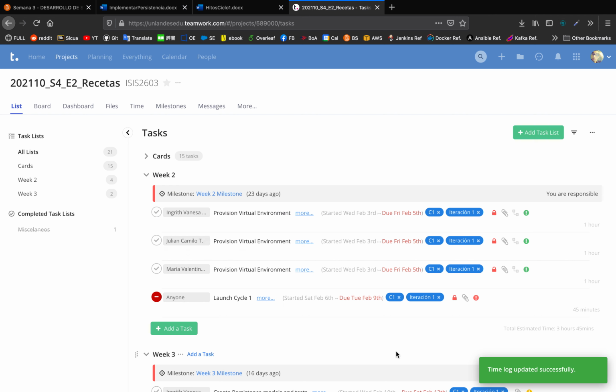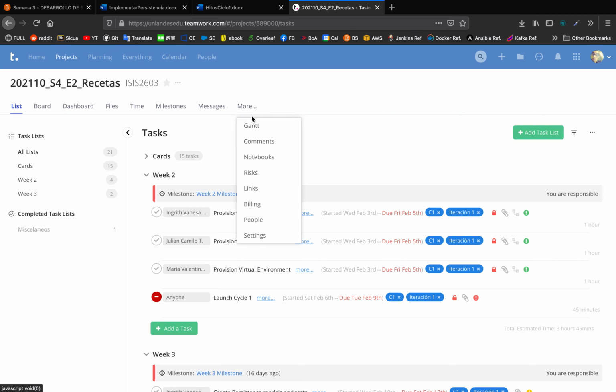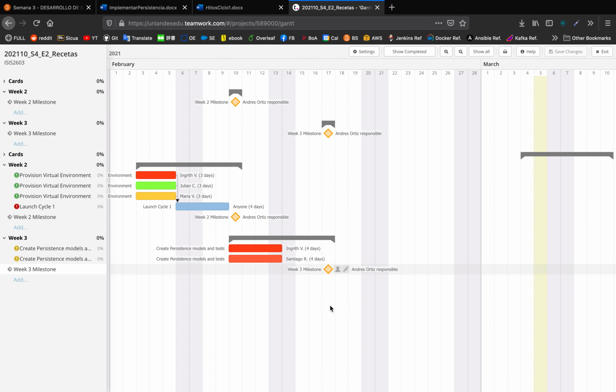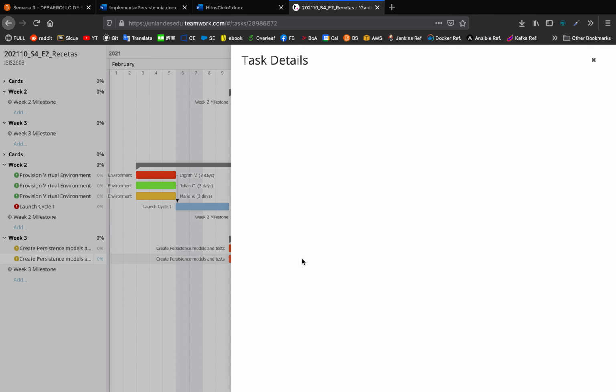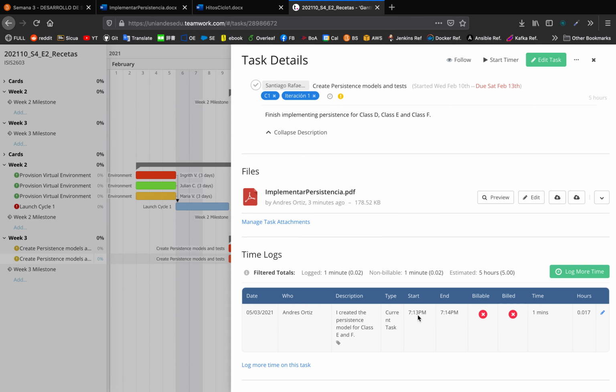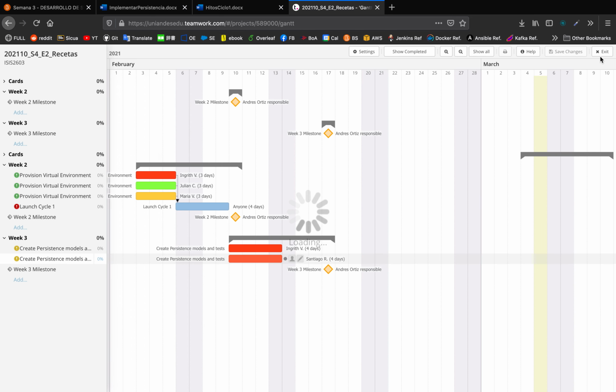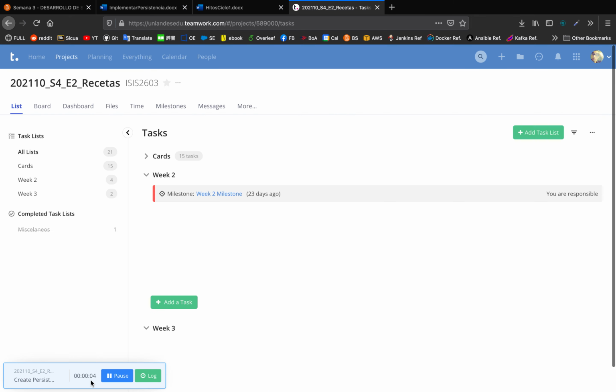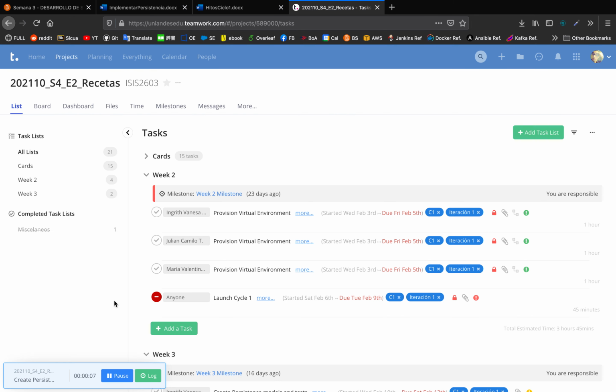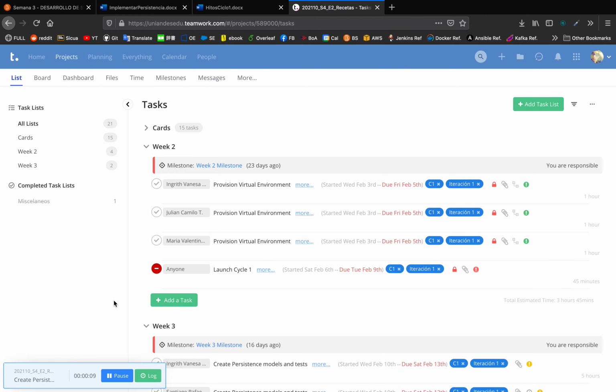And let's say we go to work, we go to class, we eat lunch, and then when we come back, we're going to come here to Gantt once again. I'm going to go onto this activity once more. Okay. And I'm going to hit start timer again. See, here we'll see the billable time. So if I exit this, you'll see that my timer is running here, right? So what you're gonna need to do, guys, is to log how long you spend on each of these tasks. That way your planning gets more and more efficient.